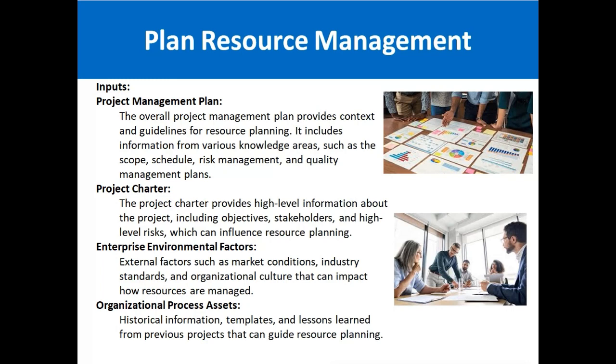The first input for this process is the project management plan. The project management plan includes information from various knowledge areas such as scope, schedule, risk, and quality management plans. So it is a very important input for resource management. Whenever you have clarity about the scope which we are going to deliver, only then can you estimate how many resources and which types of resources are required for completion of a project.